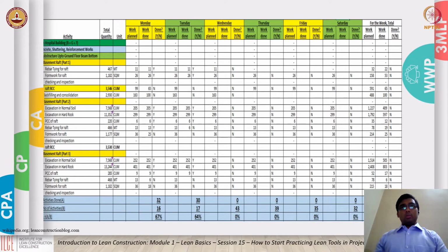What should be done, what can be done, and what will be done are the key parameters discussed at the beginning of week, and the constraints related to the work are noted down and then is reviewed daily. This helps eliminate waste due to defects and motion.